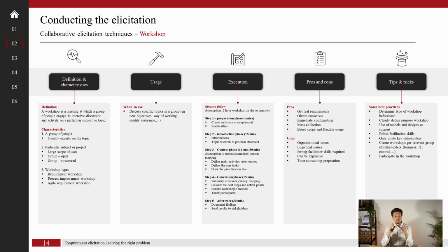It can be an idea to hold multiple workshops, one for each type of requirement. So you could set up a workshop with legal to create the legal requirements and have a separate workshop with data analysts to create the data requirements, for instance. Next, you need to ask yourself, what is the maximum amount of people you should invite? Like for brainstorming sessions, I would try to limit the maximum amount of people to 8 or 10. As mentioned, you can split the workshops by business unit and type of requirements. As to where the workshop can happen, it's a group discussion, so a simple meeting room should do the trick.